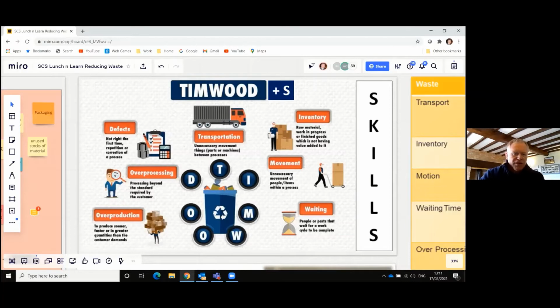I understand from recent research that 39% of all injuries on a construction site are caused by defects. And this is because we have to do the task again. So there's a good, strong correlation between getting things right first time and increasing safety on site.